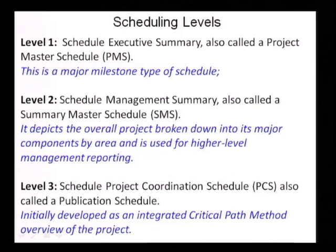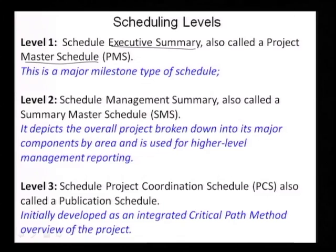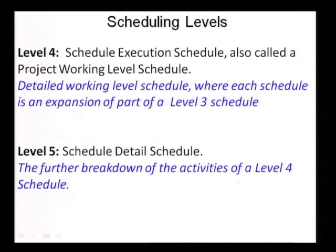When you look at the schedule, we will take this up from the next class as to how we go into the detail of scheduling. But it is very important to understand that scheduling can be done at different levels. You have what we call an executive summary or master schedule (level 1), a summary master schedule (level 2), a project coordination schedule (level 3), and when you go into level 4, you have the project working level schedule and a detail schedule (level 5).